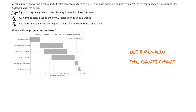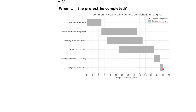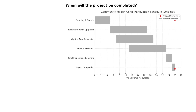Let's start with reviewing the Gantt chart first. If you are going to take the PJM exam, you should expect a few similar questions like this. A Gantt chart technically shows the duration of different activities in a bar graphic. Here we see that planning and permits is going to take five weeks, treatment room upgrades is going to take 12 weeks, waiting area expansion is going to take another 12 weeks, and HVAC installation is also going to take 12 weeks. Final inspections and testing is going to take two weeks.